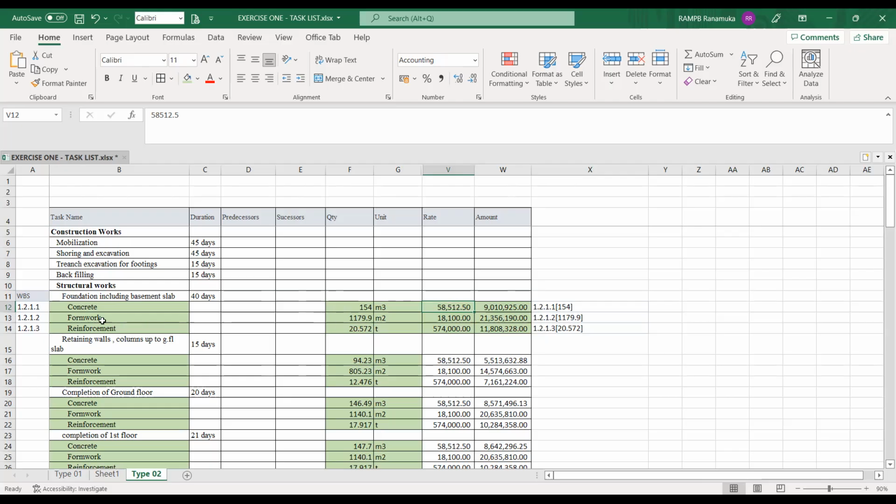For formwork also, we can give that job to the subcontractor. Sometimes we purchase the work as a subcontract, with the material. When you are giving that, we are only focusing on the 117 meter square. That means in all the formwork we are considering it as one material. We are not considering the count of plywood and such things.